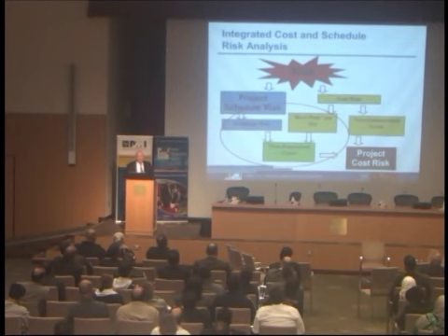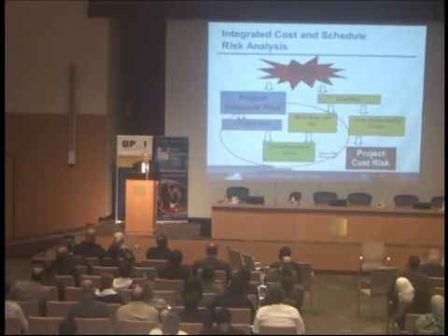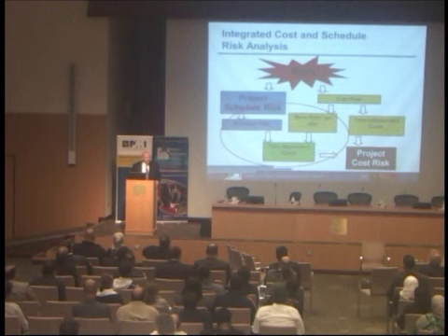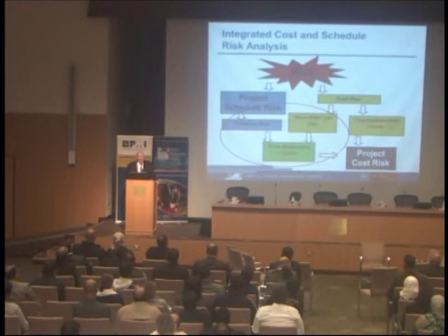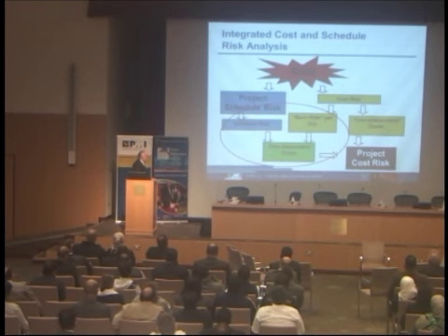And these are generally resources that are considered and called material resources in the scheduling software. But there are time-dependent resources, and a lot of them are mostly time-dependent resources. People, rented equipment, tower cranes, drill rigs, lift barges, things like that, where if they work an extra month, they cost more. And some of these barges, by the way, cost $700,000 a day, whether they work or not. Some of these burn rates per day are actually very large.